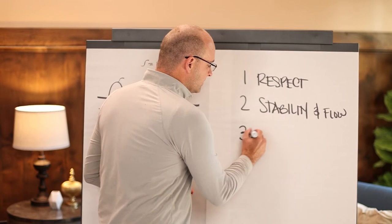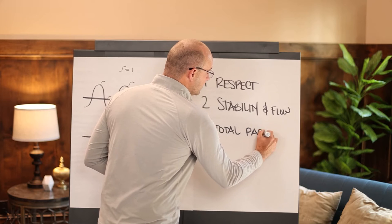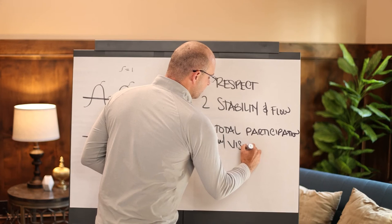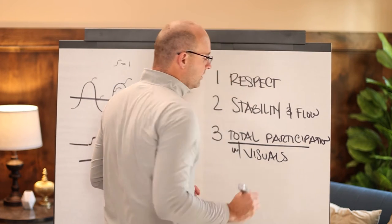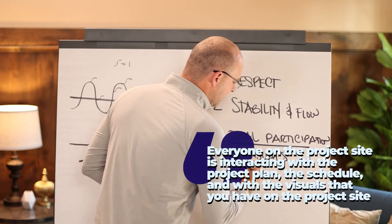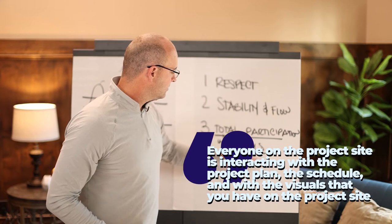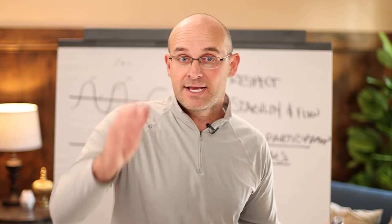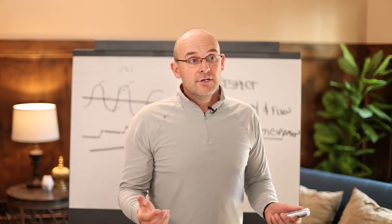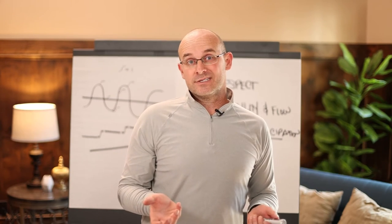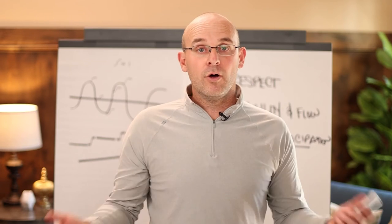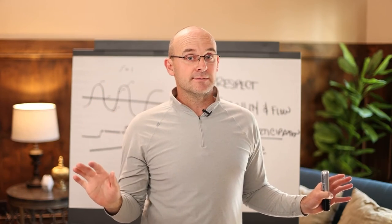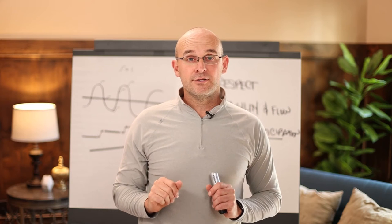Number three: total participation with visual systems. What this means is that everybody on your project site — not just a few people — but everyone is interacting with the project plan, the schedule, and the visuals you have on the project site. I don't really care if only two to twelve people are participating with the system. I want all foremen, all crew leaders, all workers participating so that you see as a group, know as a group, and act as a group — meaning everyone's following the systems. Only then can you focus on continuous improvement and quality.